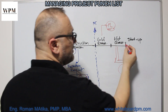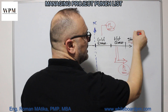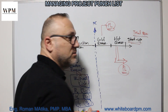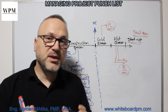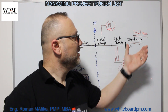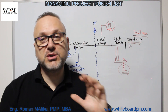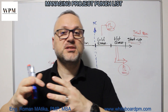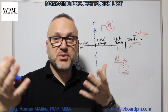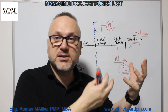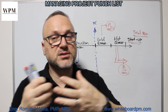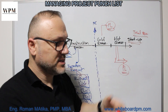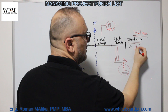Then we have startup, which is the first trial run. During the trial run there could be problems reported during operation. To put the unit into stability, the unit should be stable. Then some problems may arise — the design is not sufficient, the equipment is not sufficient, the parameters need modification. So during the startup, we also have a punch list.